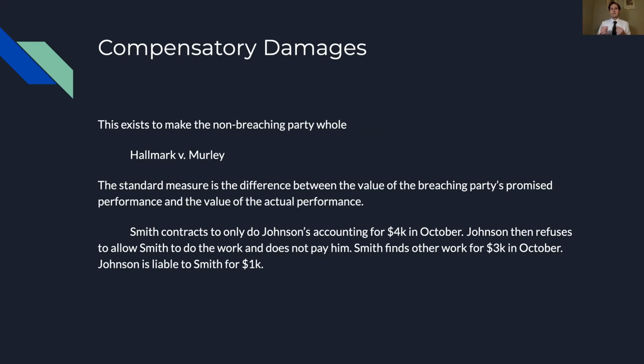What this does is it exists to make the non-breaching party whole, or in other words, put them back in the position... Well, no, I'm not going to say what I was about to say. We're going to make them whole. We're going to put them in the position that they would have been had the other party fulfilled their agreement. Let's say it like that.